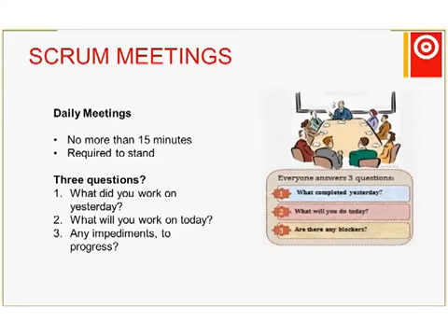So in the Scrum we have a daily meeting, a short meeting where everyone has three questions they answer: what they did yesterday, what they plan to do today, and what problems they've got in terms of what is preventing them from doing their work. So the team can jointly know what the whole team is doing and progress on the project.